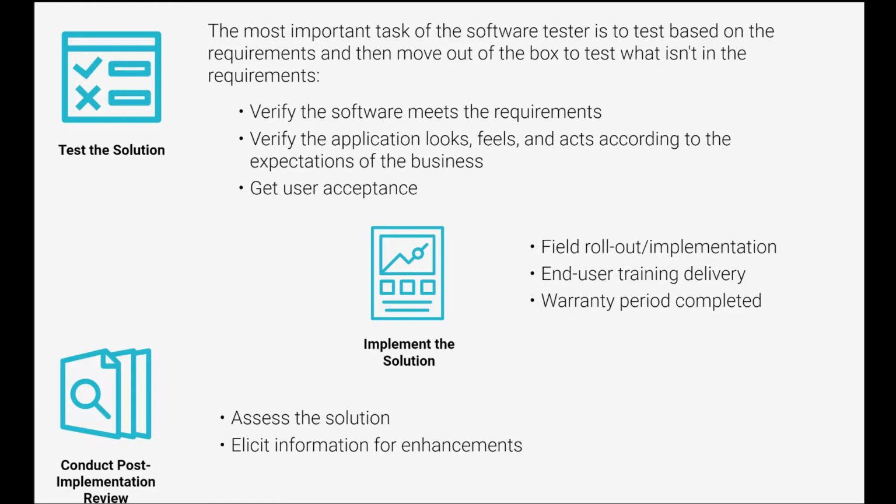Typically when there's an issue that comes up with an application, a user's contacting the help desk and letting them know that there's an issue. During the warranty period, that still may happen. Calls may still get routed through the help desk, but the issues will be getting routed to the project team during that warranty period so that the help desk staff isn't bogged down with trying to research and resolve the issues that come up right after implementation to production. So your warranty period might be a week, 2 weeks, could even be 6 weeks. It just depends on the size and criticality of the project.